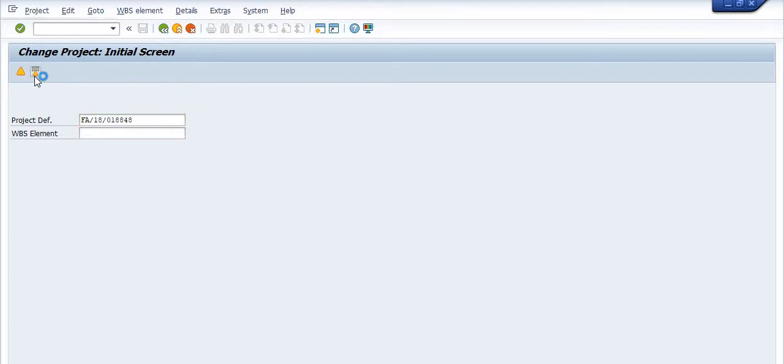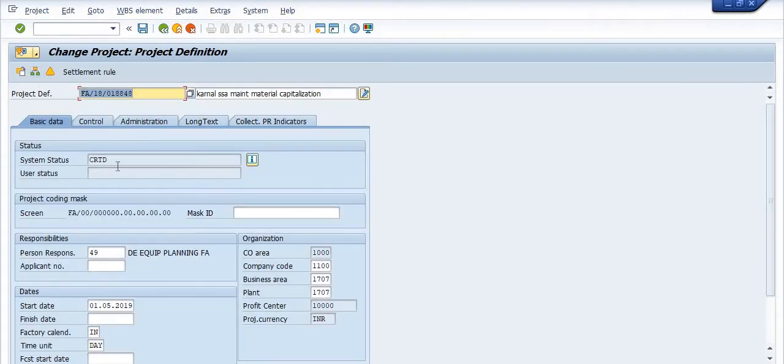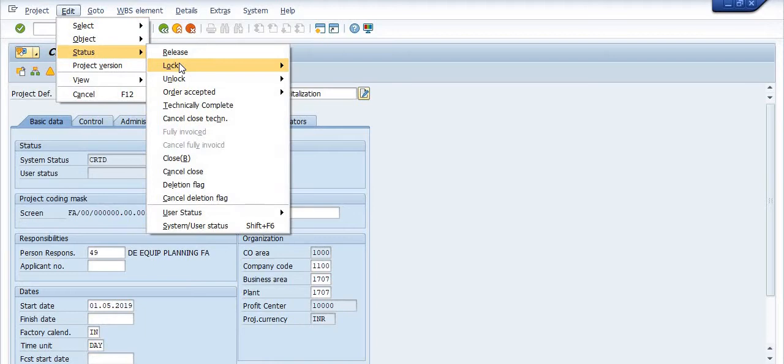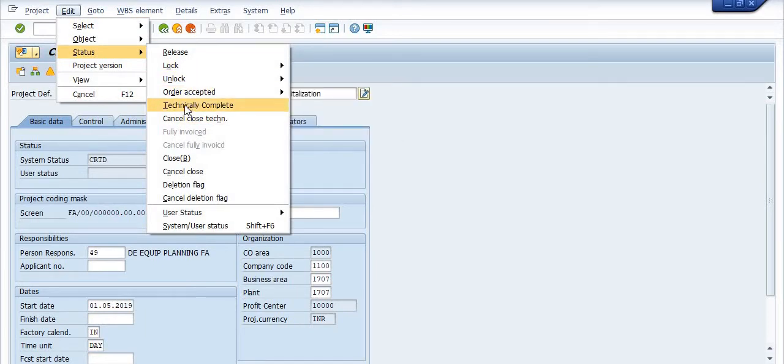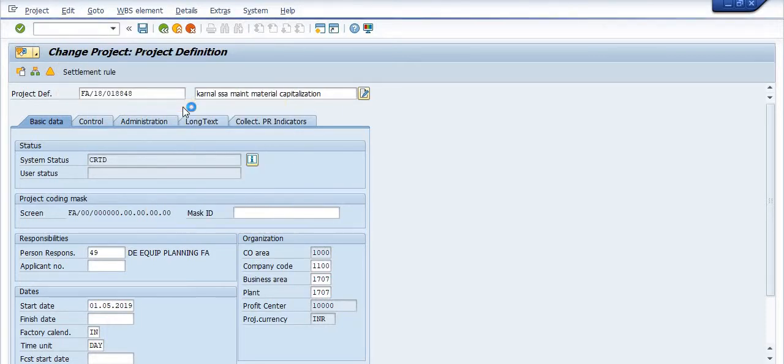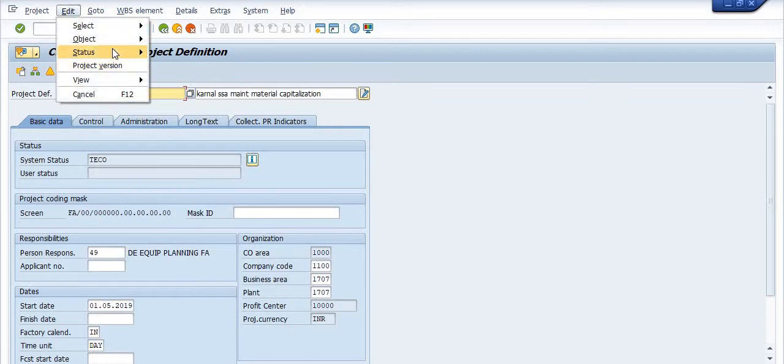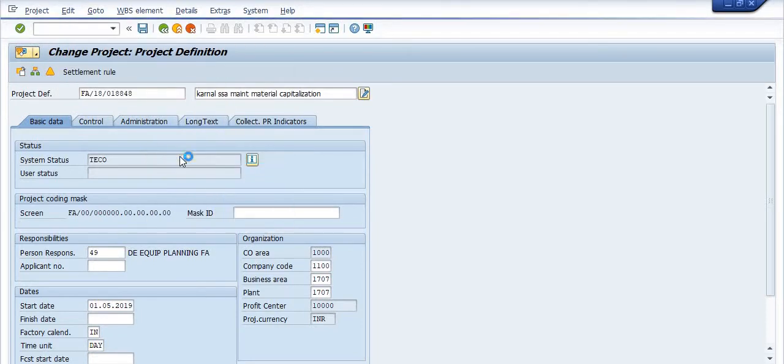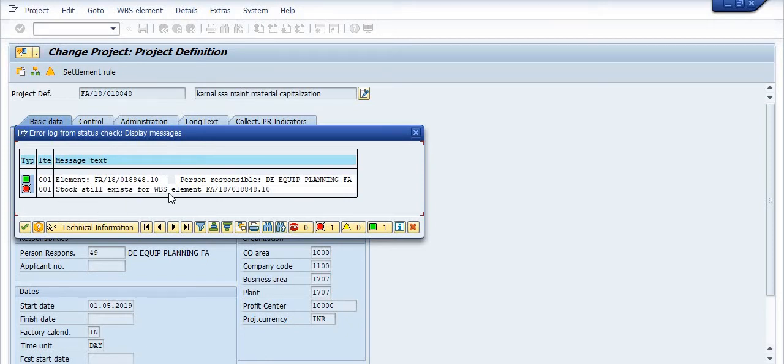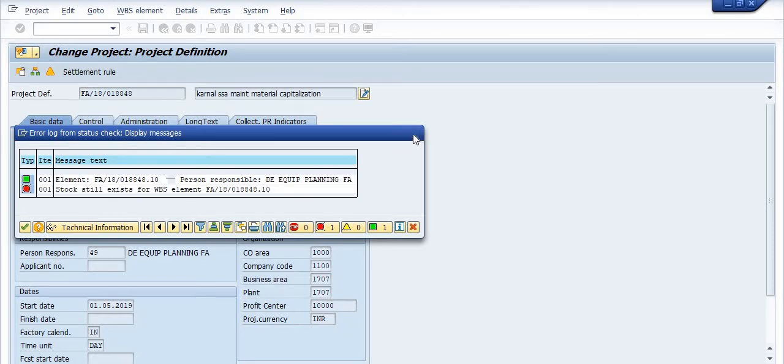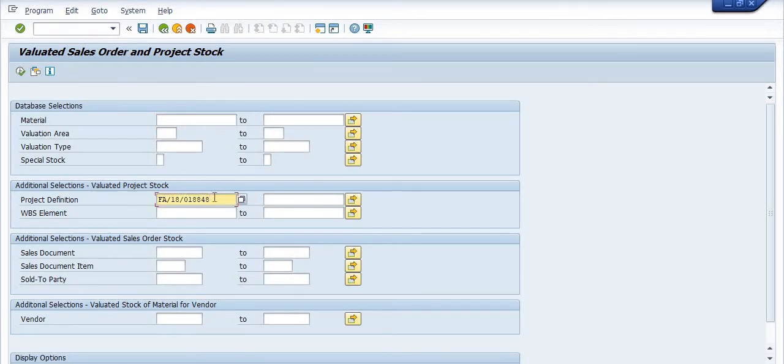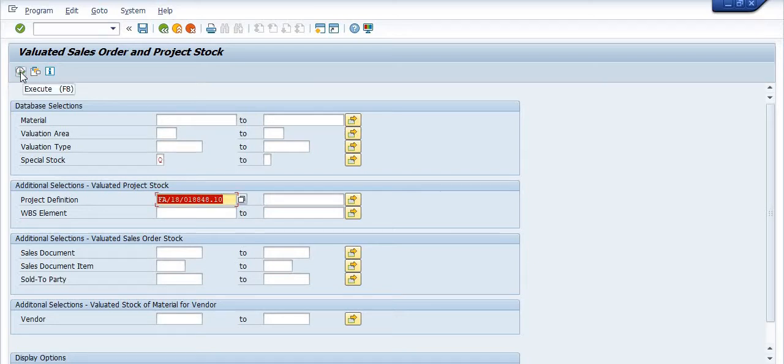Click on the project definition, go in the status, go in Technically Complete. Because this project is in the initial stage, I'm trying to close this project because no work will go in the coming future. Click on Technically Complete. Again go on the status of Close. Status information: stock still exists for the WBS element.